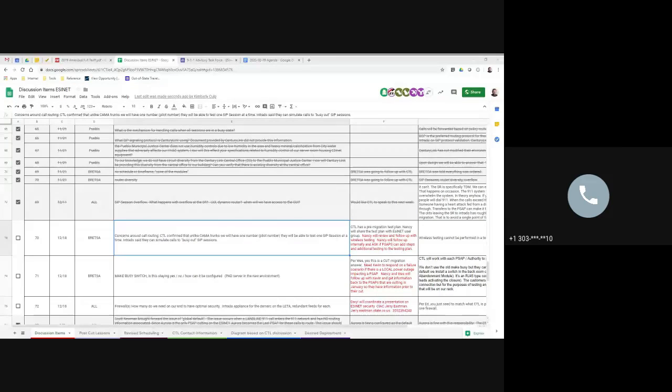So that was just an issue where on Longmont they had some shortcut buttons pre-programmed for transfer in the CPE, and a handful of those buttons had legacy 2-digit codes that they were programmed to. Those 2-digit codes do not work in the new ESInet environment. They had to be updated to the 3-digit star code transfers.